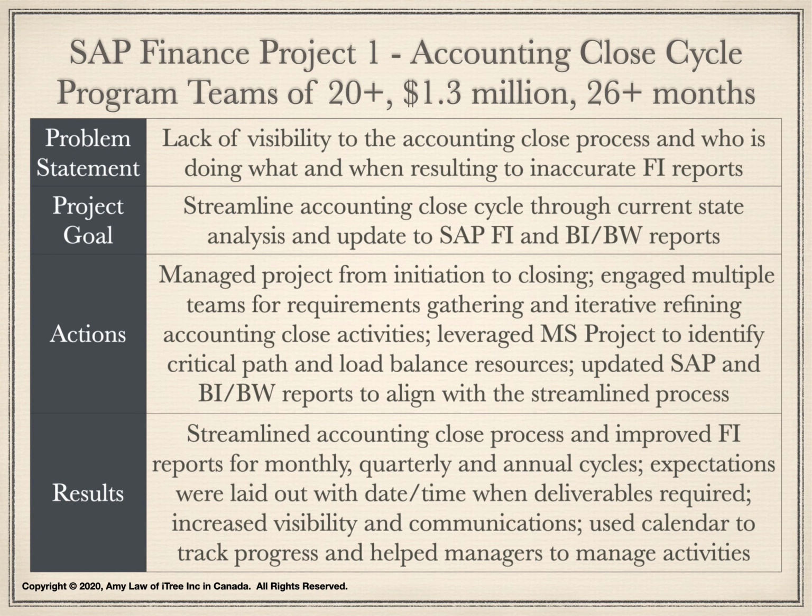I then transfer the information to Microsoft Project Plan to build a critical path, load balance the resources, and adjust the sequence so that we can streamline the accounting close cycle. I was able to map all activities, resources, date, and time to each day in a calendar covering the 10 days before and after the closing. So we know exactly what and who should do on day 5.